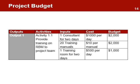The project budget lists the cost of all the necessary inputs required by the project. This might include personnel, basic office premises or facilities, equipment and materials, or services such as subcontracting supplies, training workshops, and other miscellaneous inputs. For each activity, a list of inputs is prepared, and this can be aggregated by category such as materials, equipment, and personnel.